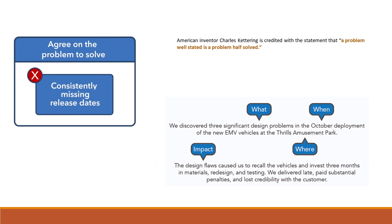So step one is agreeing on the problem to solve. Here we've got 'consistently missing release dates' as the sort of problem that someone has brought up. Our famous American inventor Charles Kettering said, 'A problem well stated is a problem half solved,' and so we've got a little diagram here on how to state a problem, using the what, when, impact, and where within the problem that we're trying to solve. That's the first focus: state the problem right and try to get a problem on the board.